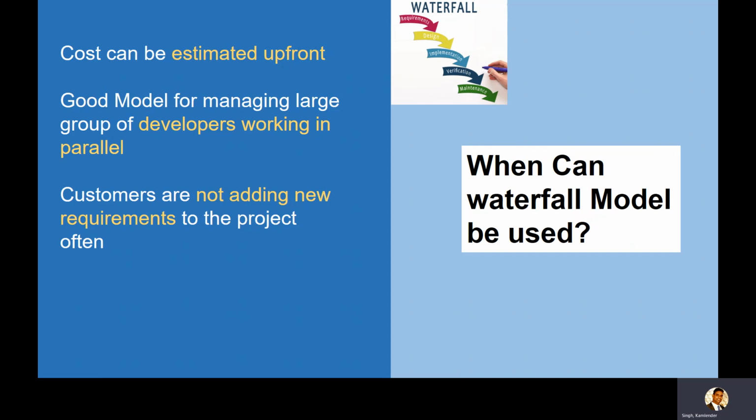Customers are not adding new requirements to the project often. I have taken an example of the migration project. If you're doing a migration, it's not a product development wherein new marketplace ideas are coming in, the competitors are doing better, so we keep on evolving the product. It's not the case. So it can be implemented for those implementations where customers' requirements are not evolving often.